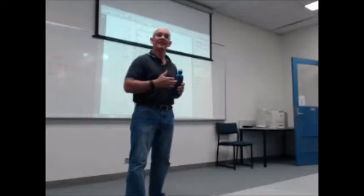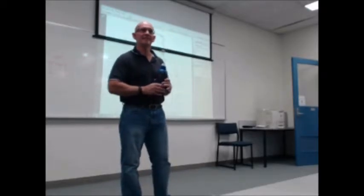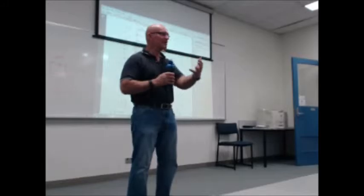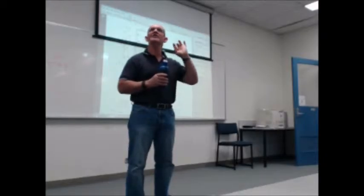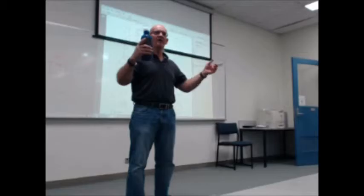But wouldn't you communicate that before they come to it? I explained it. Was that all on the contract? Yeah, it's all written down there. Cost items, provisional sums for the tiling. I verbally explained it as well. It's for tiling, not for borders or anything like that. If you want them, there's going to be extra for the tile. They were about $7 a tile, 5 times 7 is 35 bucks, times 3, 105 bucks.